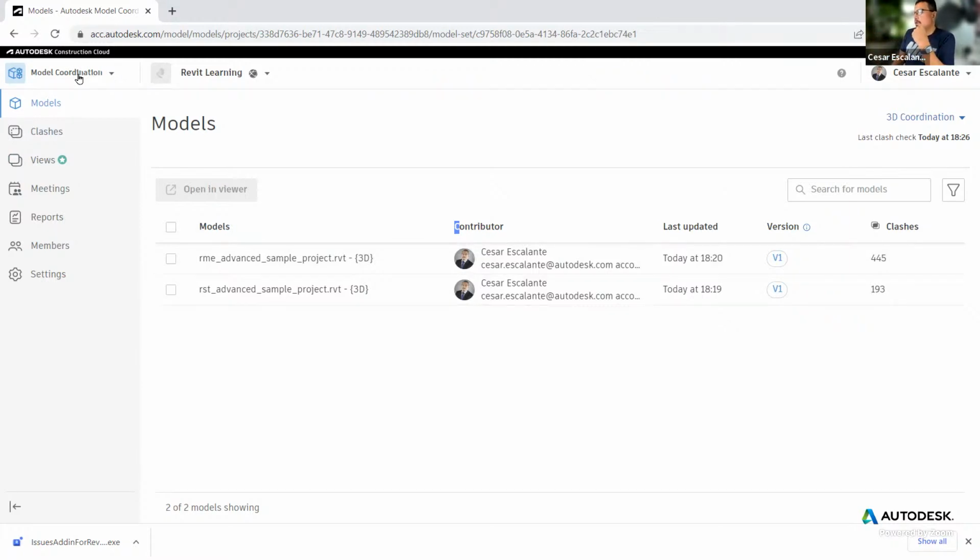And so in big projects, you designate each discipline to have a 3D coordinator, and then each 3D coordinator runs its own clash analysis, which is not visible to the rest of the team, but just visible to you and your team. And then once you do your own due diligence clash analysis, then you share this file for a larger review.